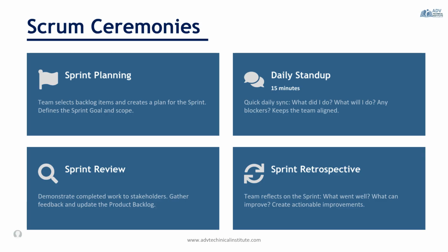We have a daily Scrum meeting, sometimes called a daily stand-up. That's a 15-minute meeting that is facilitated by the Scrum Master, and 3 questions get answered by the developers. What did you do yesterday? What are you doing today? And are there any roadblocks? The Scrum Master ensures the event occurs and helps remove impediments, while the product owner may attend but is not required.